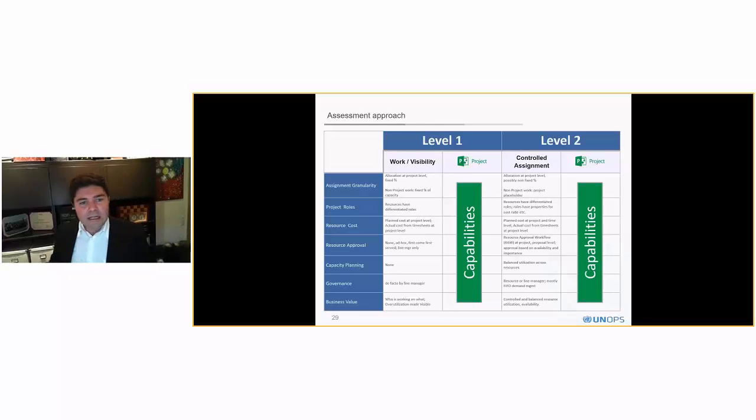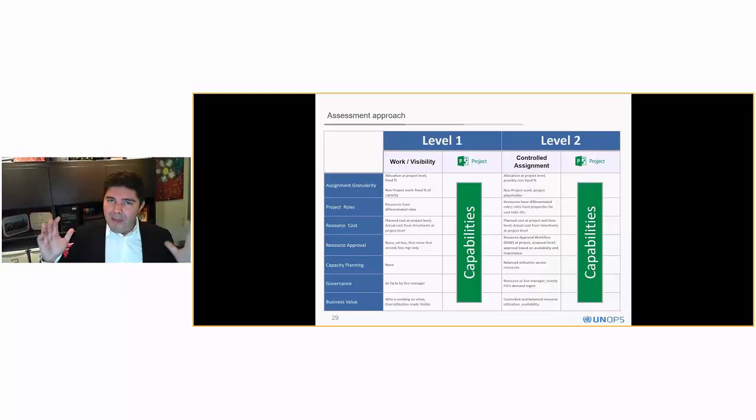And if you look here, this is just an example of how you can use the dimensions and levels, matching directly with your tool. It could be any tool here, but you can look at each one of the levels and dimensions and see all the capabilities of each tool that you have selected. So for Project Online, just as an example, if I'm talking about resources having different roles, I can easily match that with resource custom fields and the resource RBS in my Project Online environment. So use this to match and know exactly which capability you are going to roll out in your tool.